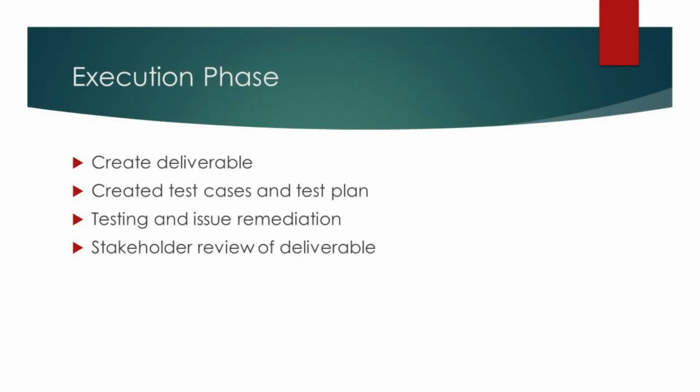The execution phase. The execution phase of the project management lifecycle is where the deliverable and everything that will be used to test the quality of the final deliverable is developed, whether you are overseeing the construction of a building or overseeing the creation of a software application. While the developers or builders are grinding away at creating the deliverable, the business analyst should be busy creating test cases and test plans to test against the requirements generated during the planning phase.